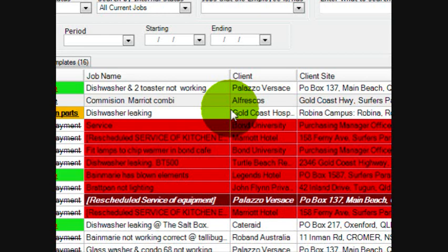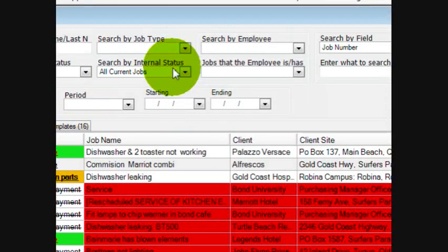If you didn't archive the job and you had lots of jobs like that over time, your work in progress report is not going to be accurate, because it's going to be including money that you're not going to end up chasing in jobs that are effectively closed. By archiving them, they won't appear in the report, so you're getting a more accurate view on true work in progress.